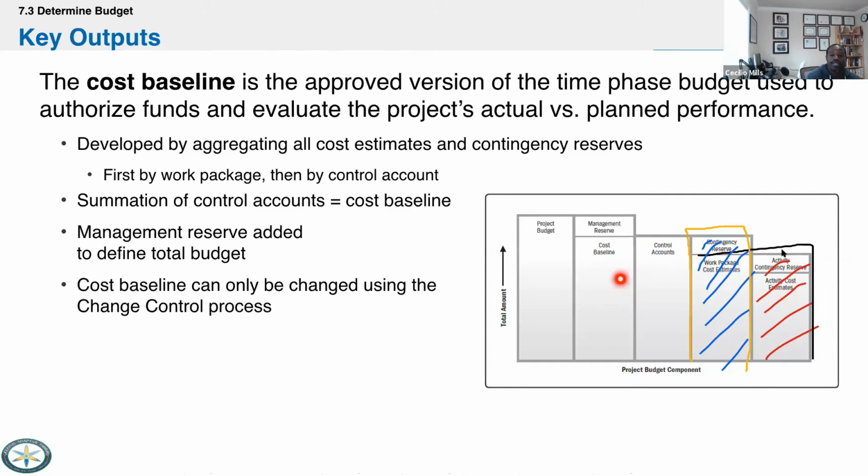This is what we call the project budget today. What we all know as PMs as project budgets is really the cost baseline for PMI. And then this is the management reserves, and we don't know what this number is. Let's say you're doing a project for a client, creating a product for them, and they want to make changes and the changes cost money. They'll sign a change order and you'll be fine. That'll roll up into the cost baseline. You'll get approval and readjust the cost baseline.